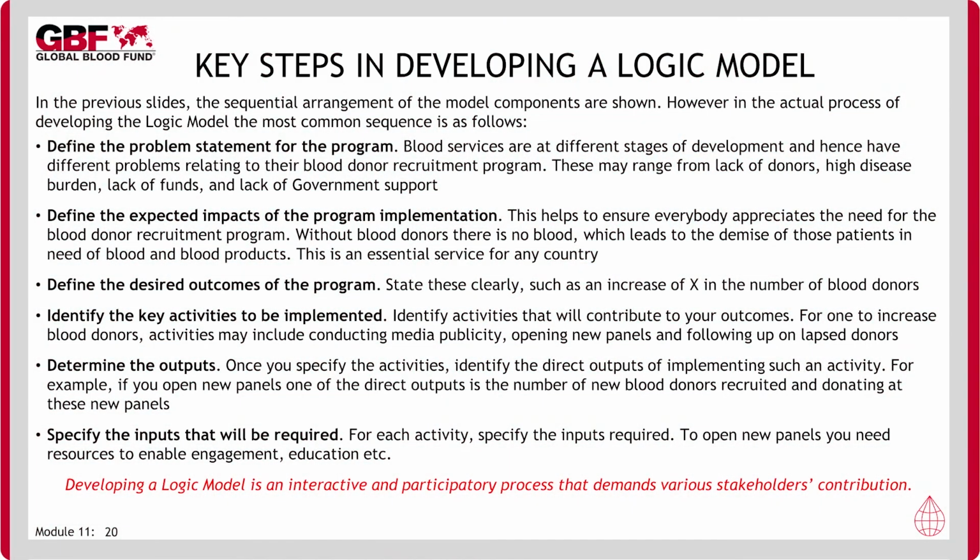Developing a logic model is a stepwise approach that involves specific activities. The first task is to develop a problem statement for the blood donor recruitment program. The formative evaluation can help at this stage. Thereafter, there is need to define the expected impacts and desired outcomes of the program implementation. It will be important to identify the key activities to be implemented and determine the corresponding outputs. Lastly, there is need to specify the inputs that will be required. It is important to emphasize that developing a logic model is an interactive and participatory process that demands various stakeholders' contribution.